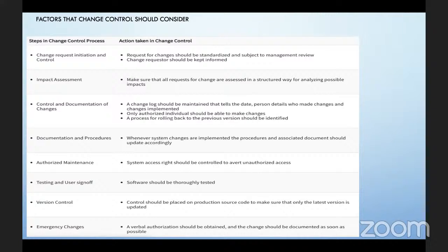Yes, sometimes prevailing conditions might not help us go through this whole process, but we need something critically done, an emergency. We can do it, it's going to come up sometime. Somebody, the manager or a senior person, will give verbal, oral approval and say yes, let's go ahead and do it. He's going to authorize it. But after it's done, we have to document it. It's very important that we document it after the fact, because it was an emergency situation.